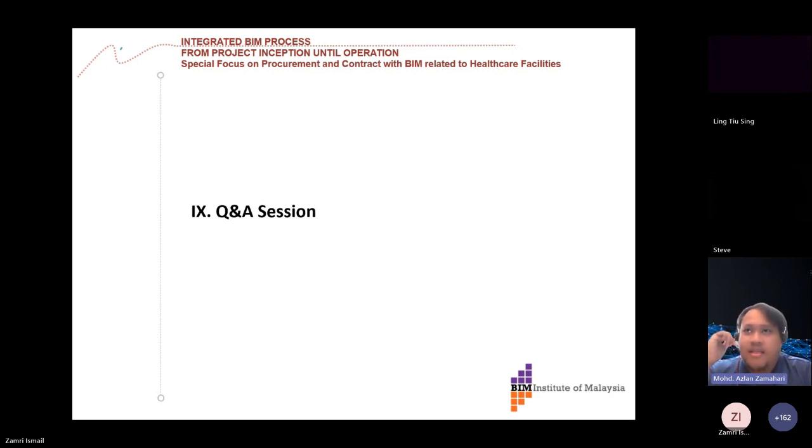But I mean, is this BIM manager a position within the clients, or within the contractors' organization, the main contractors' organization, or the consultants' organization typically? Okay, good question, because the arrangement can differ. For one project, the BIM manager is appointed by the main contractor, put directly under them. For another project, since they take the architect as the lead consultant for the whole project, they want the BIM manager to also be appointed by the architect or by the lead consultant. But the BIM manager is answerable to all.